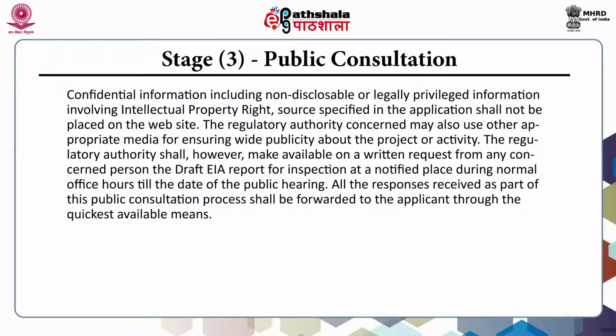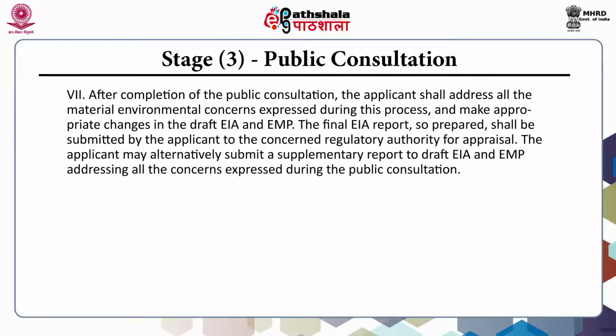All the responses received as part of this public consultation process shall be forwarded to the applicant through the quickest available means. After completion of the public consultation, the applicant should address all the material environmental concerns expressed during the process and make appropriate changes in the draft EIA and EMP.